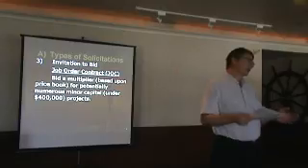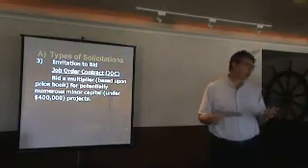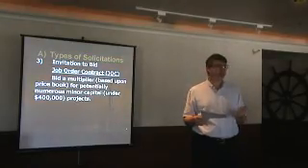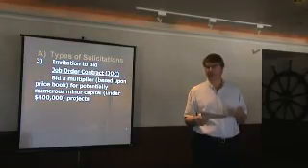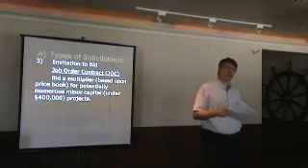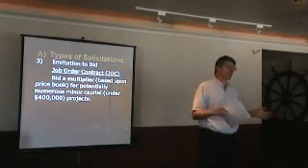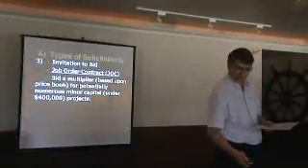With a job order contract, you're bidding a multiplier, and the cheapest multiplier wins. It's a competitively bid situation. You're awarded the job contract. The only thing that we currently guarantee you on our job contract is $50,000 worth of work over the one-year term. Maximum value on most of our JOCs is $3 million, so it could be as much as $3 million. The term is limited to 1 year from the notice to proceed.